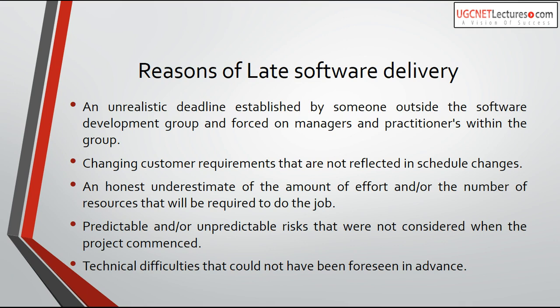There are real reasons why software is delivered late. One is an unrealistic deadline established by someone outside the software development group and forced on managers and practitioners. The client may not know how complex the software is or how long it will take, leading to an unrealistic deadline. Deciding the deadline should be the work of the development team, who evaluate how much time each activity will take and how time can vary — not someone who doesn't know anything about the development process.